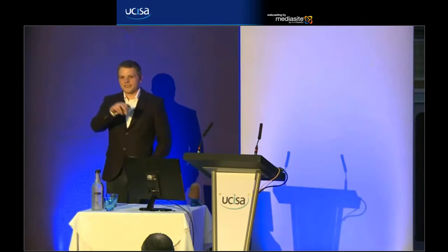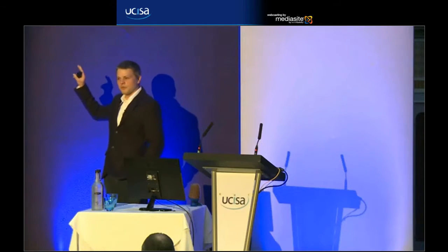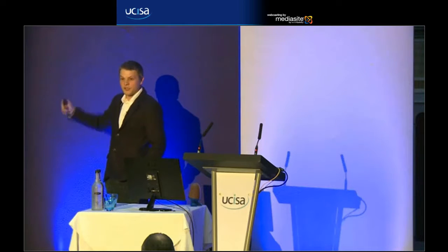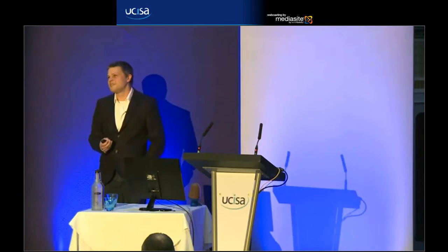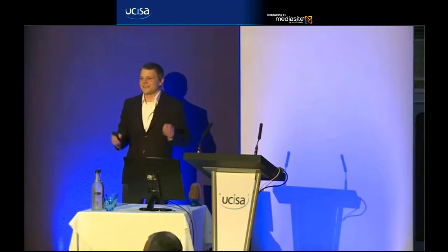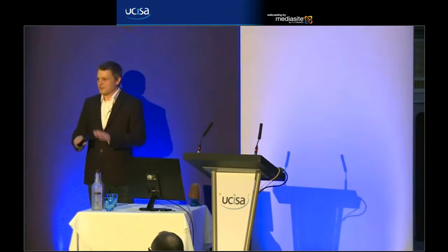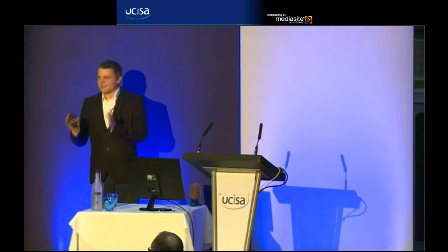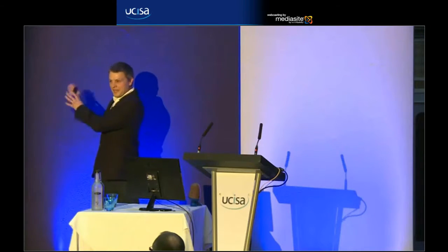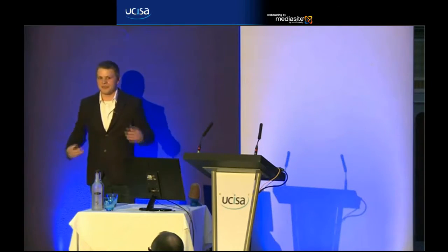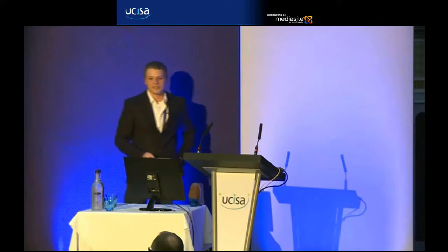Just to give you the context of how we do that sizing, when we have these Agile Story points, we talk about 1 point being equal to an ideal day. That is, you come into the office, you have no interruptions, you don't have lunch, you do nothing but that one thing. Of course, that doesn't happen in real life, so that's only to give everybody a context about the type of size that you're talking in the points.